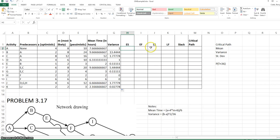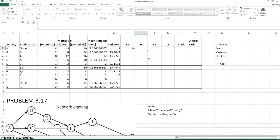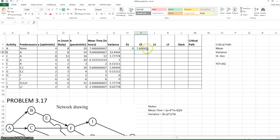The early start time for A is zero because it has no predecessors. The early finish time for A, and any activity, is the early start time plus the mean time. I'm going to click on the bottom corner of this cell to copy that down.